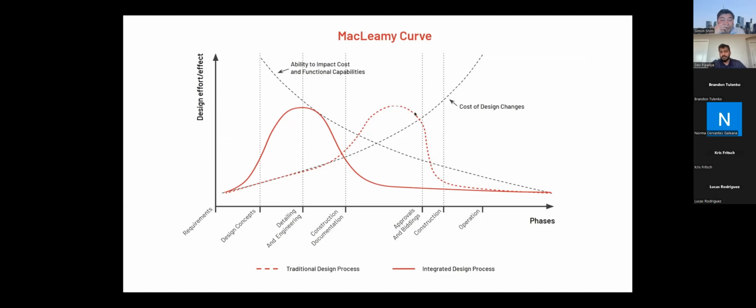And once you find out an issue and it's too late, there's a lot of construction cost that goes into it. That's production cost, that's labor cost, there's time, there's everything that's being wasted. But if you figure out the issues, which is the red straight line, before even the construction starts, you can already start working on the changes that need to be done.